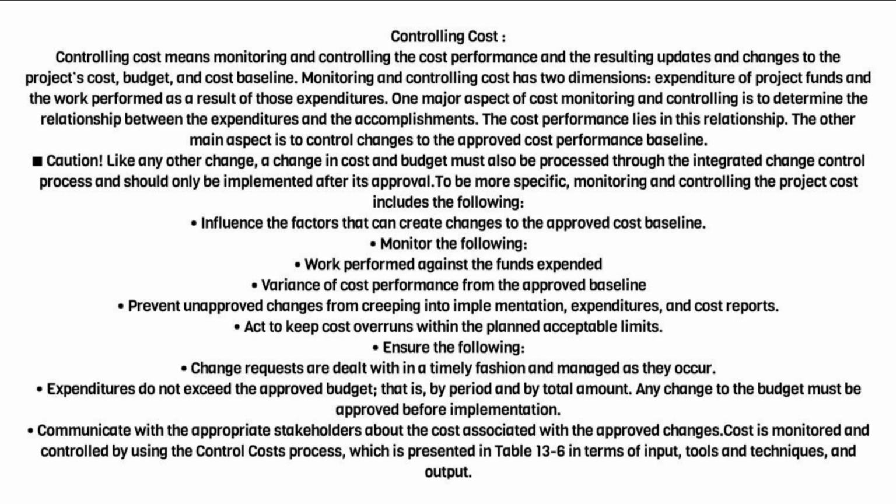Caution: like any other change, a change in cost and budget must also be processed through the integrated change control process and should only be implemented after its approval. To be more specific, monitoring and controlling the project cost includes the following. Influence the factors that can create changes to the approved cost baseline.